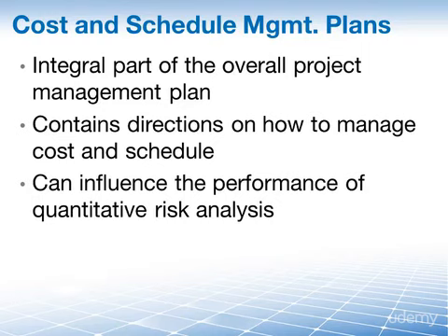quantitative risk analysis. For instance, think about the stakeholder tolerances in terms of cost, especially when taking risk with those costs. A tight, cost-conscious organization may require extensive quantitative risk analysis to strategize against the possibility of loss on your project, or that cost consciousness may override any quantitative work to be done if the cost to perform them are too great.